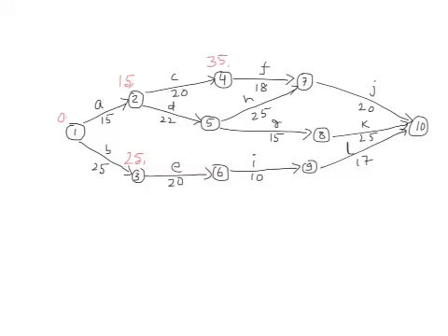For node 5, if you see, then here the activity D takes 22 days, and it can start from node 2 where the earliest time is 15. So 15 plus 22, 37, that is the earliest time for node 5. Now for node 6 the earliest time will be 25 plus 20, which is 45.